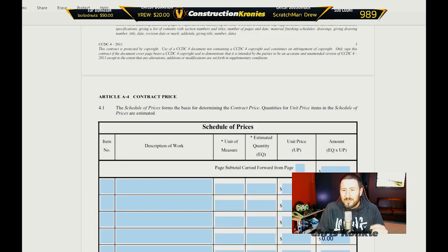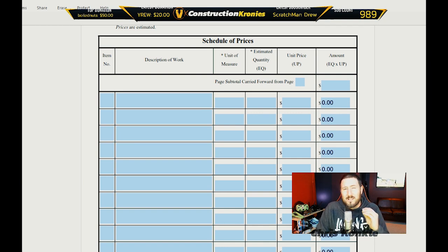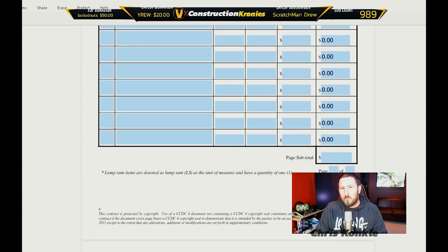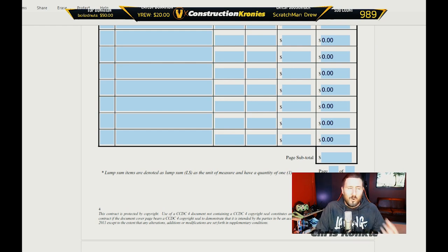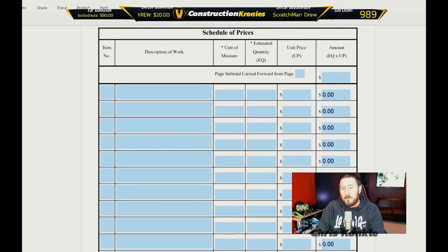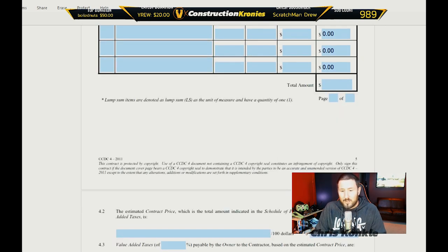Here you can see the schedule of prices — exactly what I was just talking about. Description of the work, unit of measure, estimated quantity, unit price, and then there's an estimated amount. So that's just an estimated amount. There'd be certain lump sum tolerances and things like that you could add. You could do unit price with a guaranteed max price as well, which is another type of contract. But for now, this is basically what it is — it'll tell you the type of work, the material, the time, and a certain price per unit.